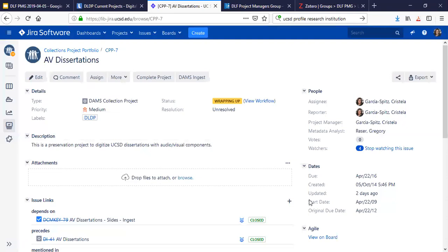Yeah, think about how one thing relates to the other. Is it overlapping, or is it parallel to the other work that's being done? And I would ask, how complicated is the workflow? Does it need a JIRA ticket, or could it be something that's just captured on the project plan? Could you have a checkbox on the project plan that says, follow these 3 steps? Because that's maybe easier than having a whole JIRA ticketing system for what's essentially 3 steps, you know?